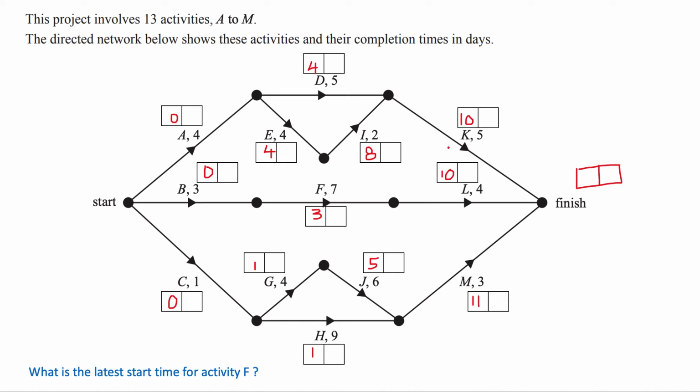When we look at the finish time, and we already knew the answer from the previous question, K will finish after 15 days, L finishes after 14 days, M finishes after 14 days. So the whole thing's not finished until K finishes, which is going to be 15 days. So that's working through to get all the earliest start times.